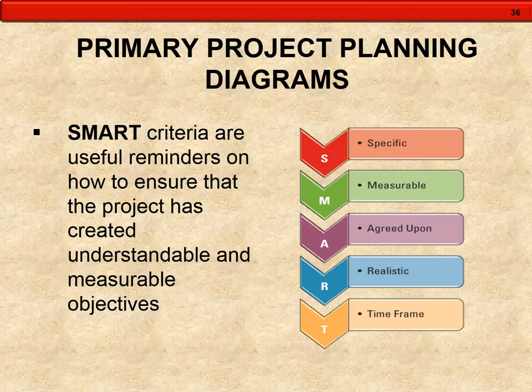Don't promise the client that they can have this project by the end of the week, and it's Monday, and it's a 60-hour project, and you only have one person who only has 20 hours of time available that week to work on it. It's not realistic to expect that other coworker to work overtime, and promising it to the client by Friday is not an accurate time frame either.